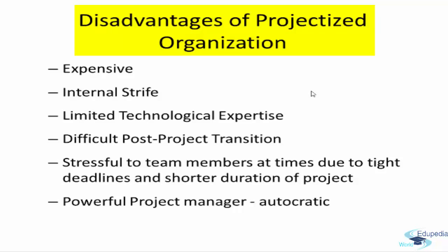Difficult project post transition, because people need to transfer the knowledge to the functional unit and various departments. So the transition needs to happen, and we may have to have a transition of about 2 to 3 months where you handhold the project and then train the regular people, operational people who are going to work in the maintenance and support for the project, and then transfer the knowledge, transfer the documentation, your experience, project knowledge, project documentation, functional areas, things like that.